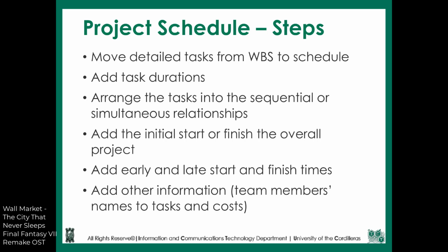Next, the tasks are arranged into sequential or simultaneous relationships. Again, this is based from the WBS and how the different tasks affect or complement each other. The nature of the task is also taken into consideration, based on whether a person can do these tasks simultaneously, should there be a limited number of team members.